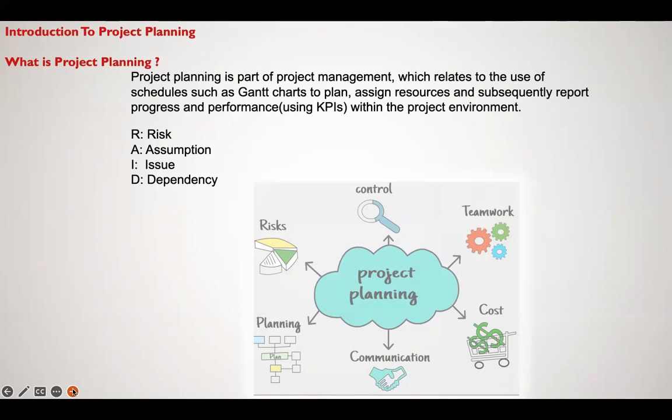So you manage risk. You first identify those risks. That's the risk management life cycle. You identify those risks, because if you don't identify them, how would you manage them? So you identify it, then you analyze the impact. If it happens, what's going to be the impact? Whether the impact is high or low, in most projects you see what they call RAG, which is red, amber, and green. They rate risk in that category. They focus more on red and green. Amber might turn to red, red might turn to amber. That's why the risk register is there, for you to put all the risks, rate and categorize them into these categories, and make sure it's a live document that people manage on site.